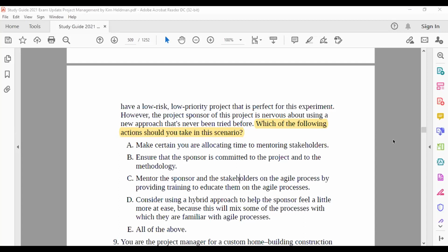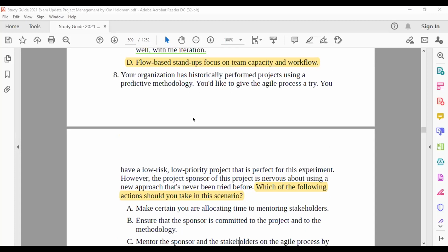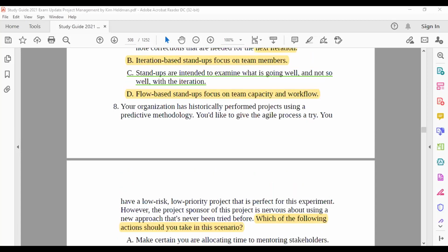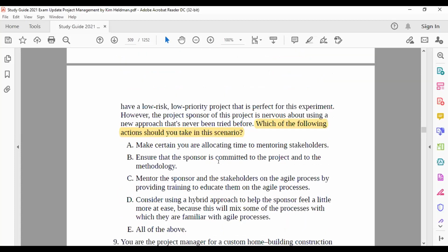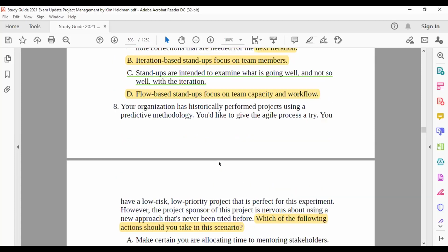Ms. Gunjan, retrospects are things which should be done at the end of the sprint or iteration to check what we were doing good, which we should continue doing, what we should stop doing, and what improvements are required before the next iteration. Before starting something new, right, sir? After finishing the previous and before starting the new. Right. So that we can go back and see what went well and not so well with the iteration which has passed. So it's something to do in the past, right, sir? The word retro is always related to the past, something which has happened, and how to improve it in the future. Right. Got it. Thank you.